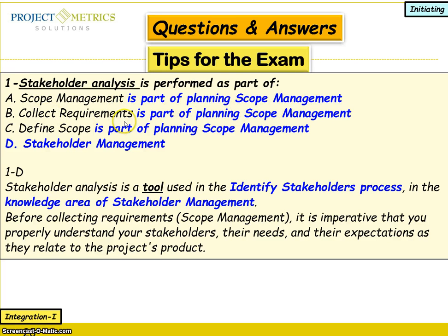Collect requirements, I'm sure you are not familiar with this, but you can use your logic. It is part of planning scope management, and define scope, again, it is part of the scope management. Stakeholder management, this might be the right one. So stakeholder analysis is a tool used in the identify stakeholders process in the knowledge area of stakeholder management.